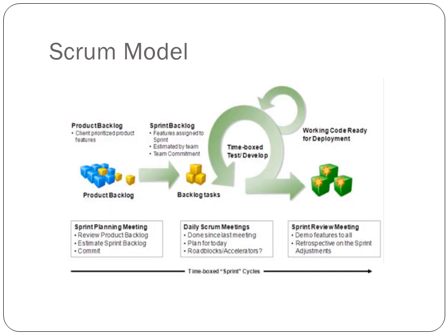Now we will see the actual Scrum model in practice. This diagram helps you in understanding how a Scrum model works. It starts with the product backlog. Product backlog, you can imagine it as a large database which contains all the client requirements but in a prioritized way. And then out of product backlog, we will be taking some of the requirements as part of this sprint backlog.